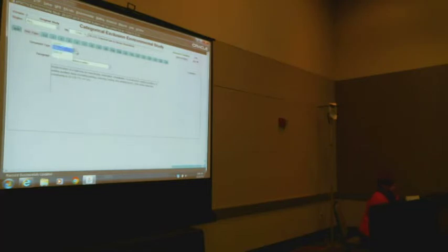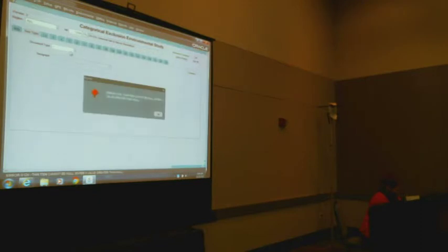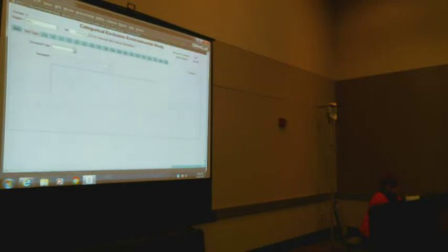So document type, it's a drop-down menu. You can pick from a state study, or a documented CE. I'm not going to go over documented CEs too much, but if you're doing a documented CE, you're required to have a class of action letter signed by FHWA, and that gets routed through Central. Somebody at Central Environmental will review your letter, send it over to FHWA recommending their approval, and that date needs to get entered. If you're just doing a regular C or D list CE, you don't need that.